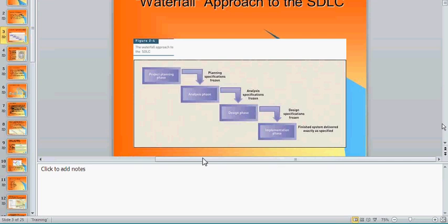Now once the design and development is complete, when we say complete, what do we mean? The developers have done their unit testing. Yes or no? And if they feel that the system has passed unit testing, then the only way for it to go is to the next phase, which is your implementation phase, where the software is going to be tested for stability and maturity, and then it is going to be deployed. Are you all clear?